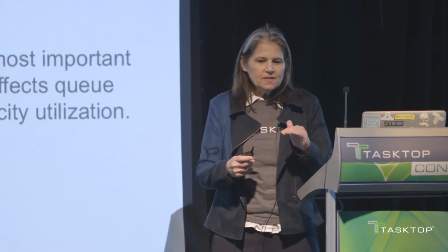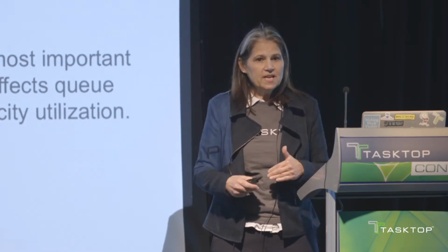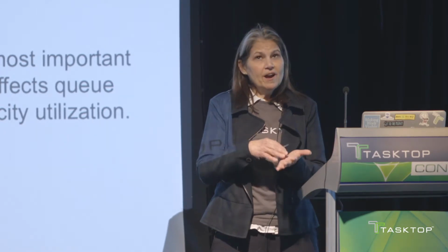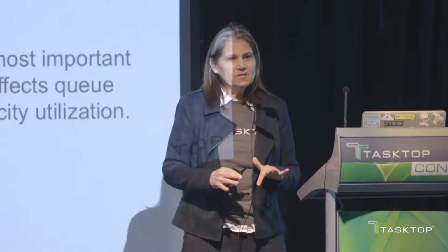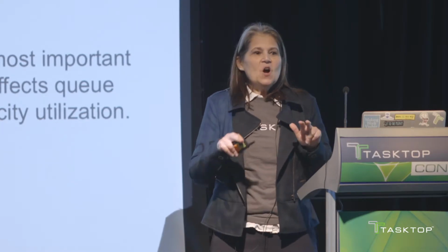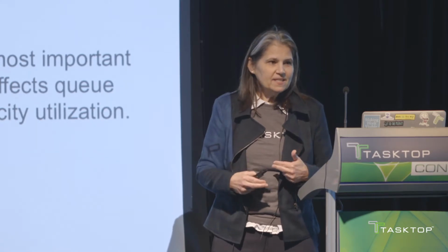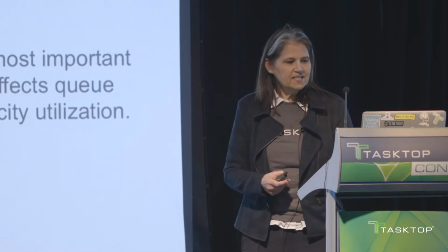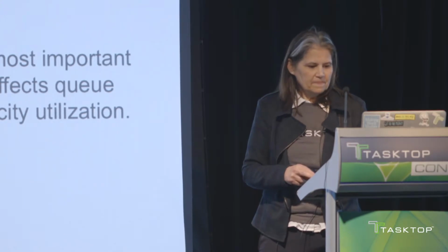As computers get utilized higher and higher, their performance slows down. Same thing happens with people, especially in areas of high variability, like in operations. And I like to say that we don't let our computers get to 100% capacity utilization. So why do we let our people? Oftentimes because we have a hard time saying no. We take on more work than we have capacity to do, and we burden ourselves with too much work in progress, and then things get delayed. So the higher the utilization, the longer the wait.